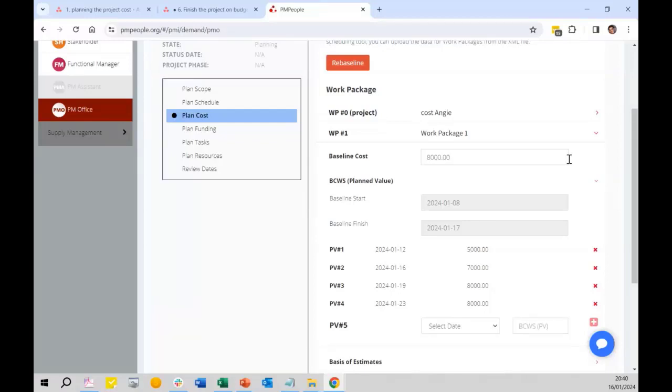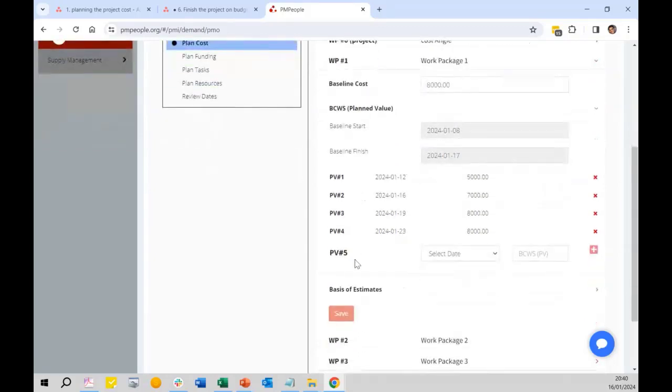But when you have this, you can say, okay, the SAP is saying 10,000, but I am sure that this is 8,000 because of this and this. And I can explain. Okay, I forgot to tell you, but this is very important: the basis of estimates. So don't keep these explanations in your mind. You are going to forget.